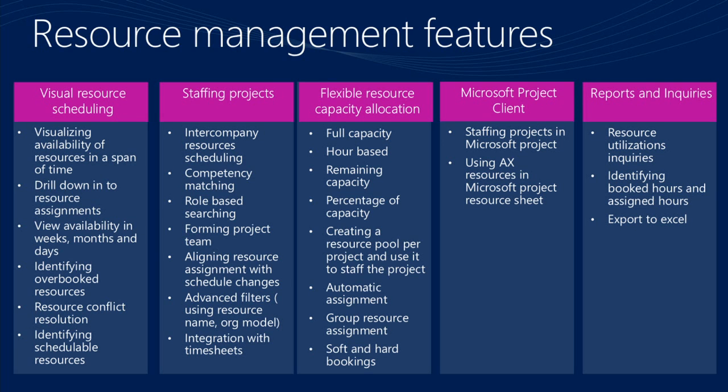And one other, I think, interesting feature, which I'm really looking forward to, is to be able to form a resource pool for projects by booking resources against the entire project and then consuming that capacity that is booked against the project on activities, right? So if I can secure a resource for 2 months, then I go to the next level, which is detailed scheduling. I can start consuming that capacity. So technically, you should not be double booked if you have been secured for my project and now I'm scheduling you. But at the same time, we are very flexible. If you want to go over that, we allow you, or you want to go under that. So that's something that we will go through in the demos and spend quite some time there.